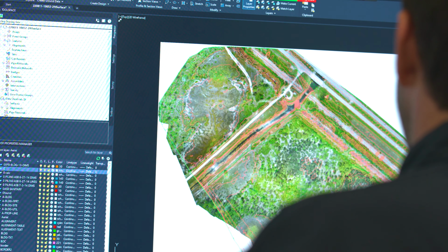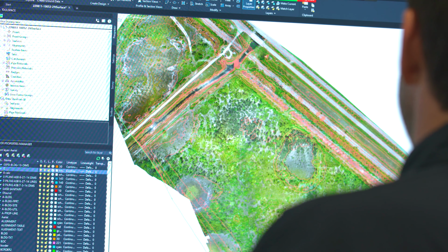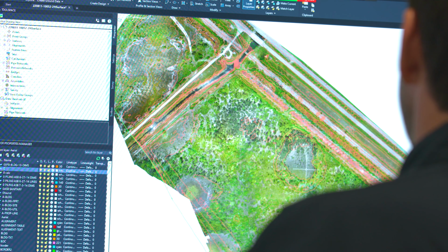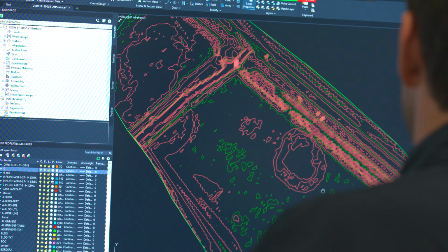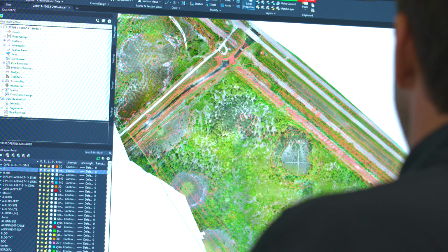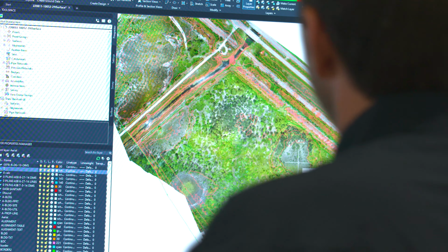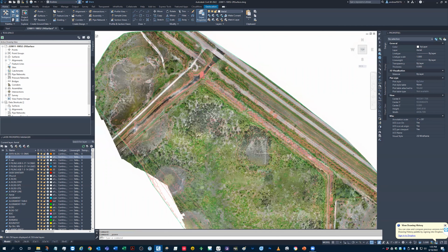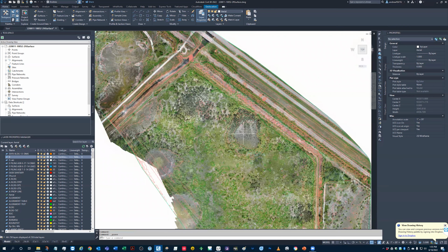To do a heavily, densely vegetated area with marsh wetlands would take weeks with a traditional field crew or multiple field crews. Whereas in comparison, our UAS operations department was able to use the TrueView 635 in conjunction with LP360 to complete a 600 to 700 acre topographic survey in a matter of 2 to 3 days, including planning, operations, processing, and deliverables.